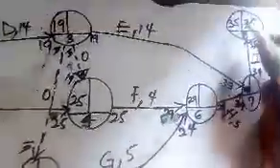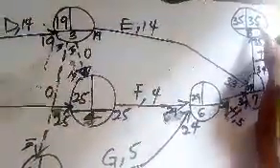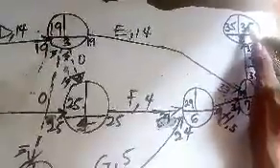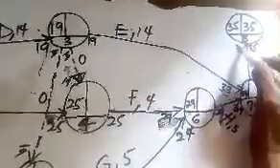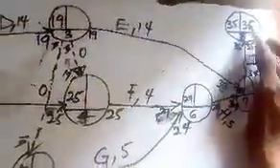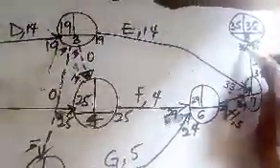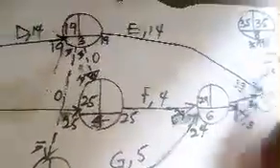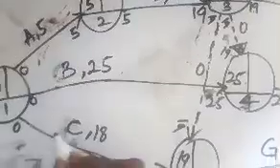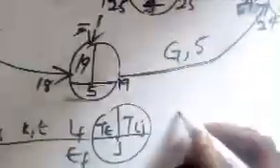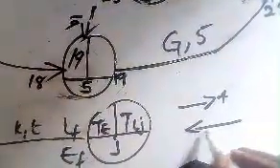So the same way you have your 35 equals 35. Just imagine I will come out with the same 35. I came in with this 35 and I came out with this 35. So I come out again with this 35 on top 35. Why? Because 35 is the only one available here. So 35. Now when I'm going further, I add. When I'm coming back, I subtract. When I'm going further, I add. When I'm coming down, I subtract.